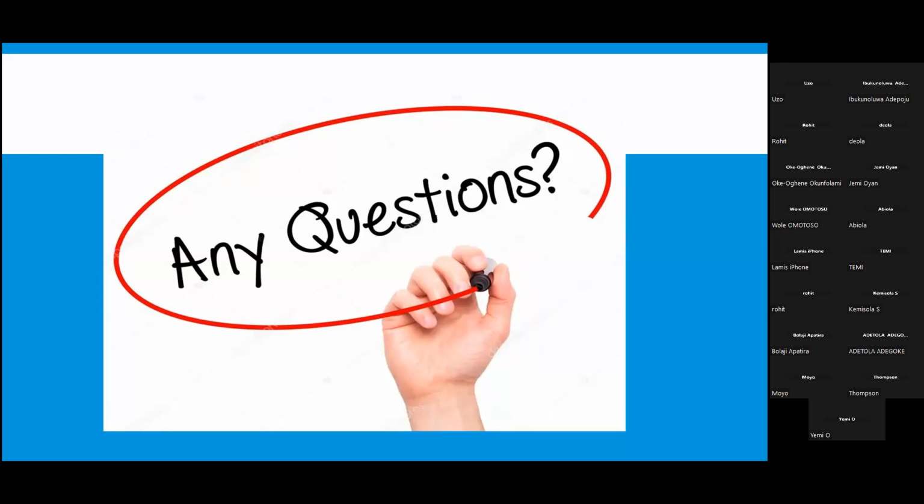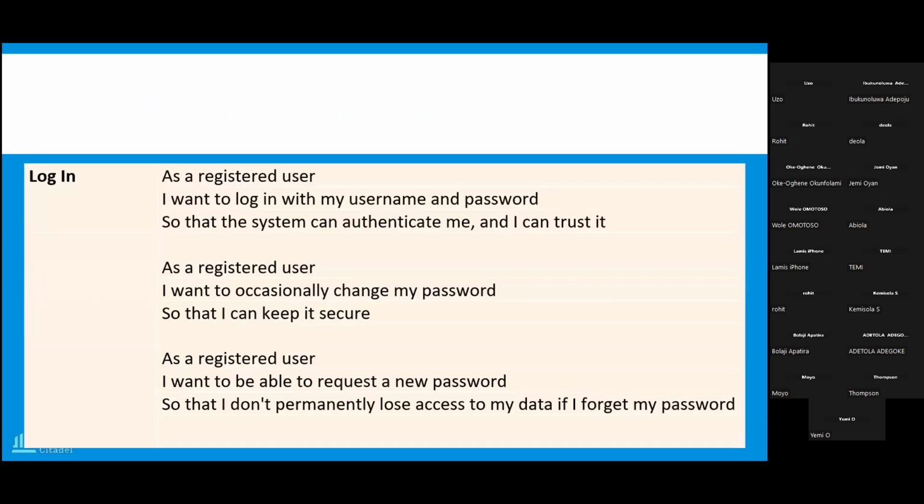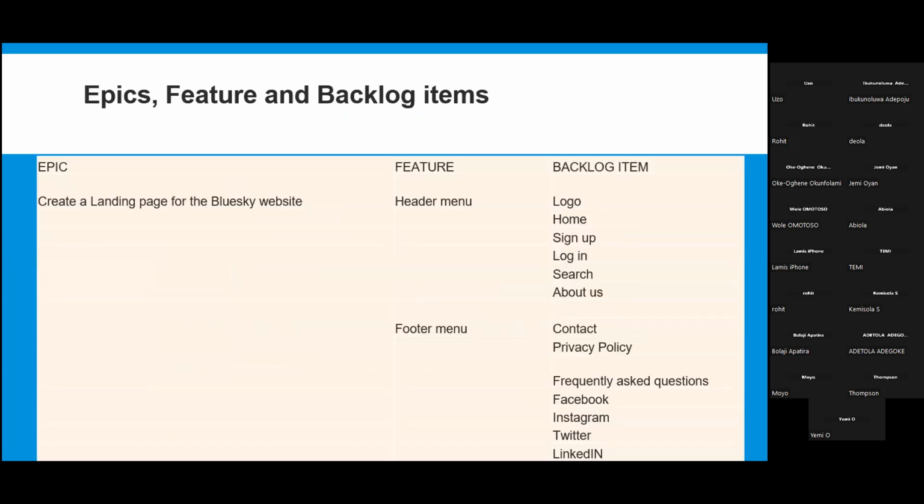So there's no way to determine like, oh, for epics you can only have 5 features, and for each feature you can have 3 user stories. No, it doesn't work like that. You come up with your user stories as per the customer requirements, and then you group them to say, okay, these user stories are related, so they form part of an epic. Sometimes you might even have written all the stories before you say this will form an epic.